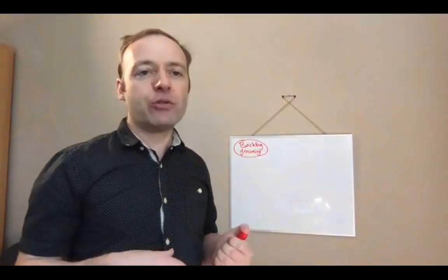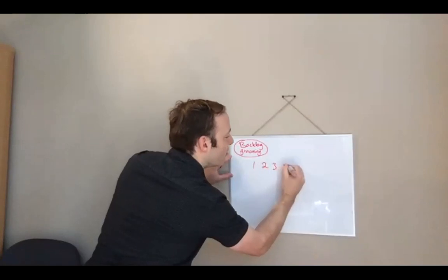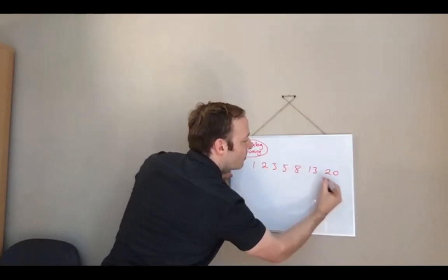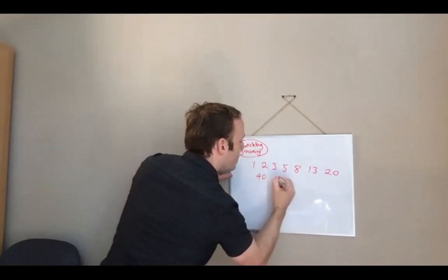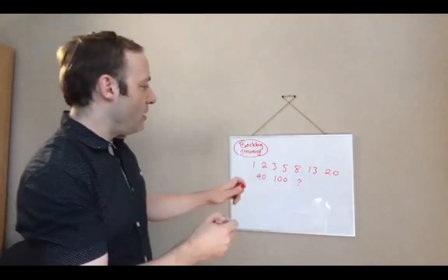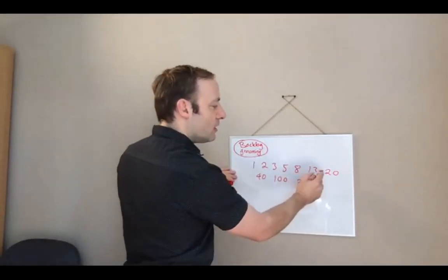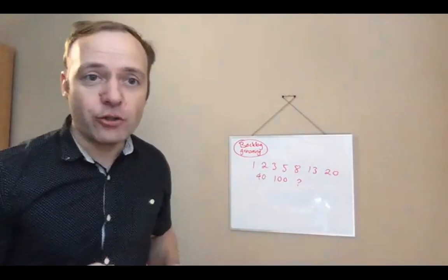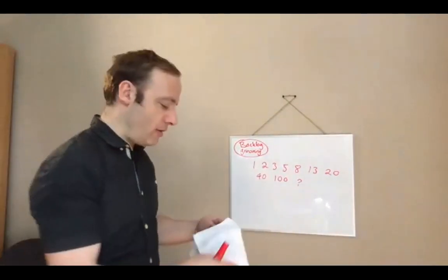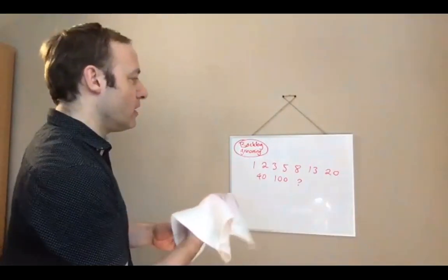So usually we use a Fibonacci sequence. So either 1, 2, 3, 5, 8, 13 points, or like 20, 40, 100, or question mark. So if it's more than 13, you should definitely break down a user story into smaller ones. So maybe you can split the user story, the ticket.